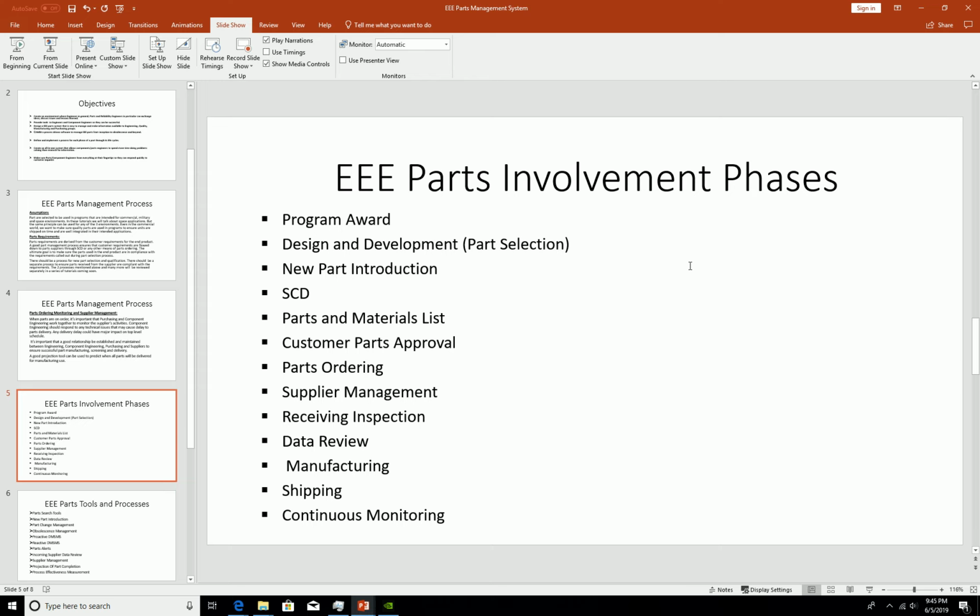Even before you receive the program, there must have been a request for quote. There must have been a customer requirements document that you have to review. Before you get the program, you have to review those documents to say, yes, I can do it. In space systems, we call that compliance metrics. We provide the compliance metrics to the customer for each paragraph of their document to say, yes, I can do this, or no, I cannot do this, but I will follow.